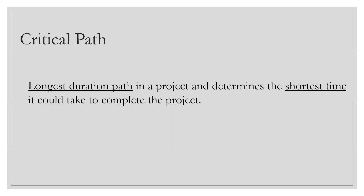The definition also says it determines the shortest time it could take to complete the project. 'Shortest time' means there is no buffer on that path — no padding, no gold plating, no extra time. The early start and late start will both be the same. You cannot delay that activity even by half a day without impacting day one. That is why we say 'shortest time' — it means zero float, basically no float at all.